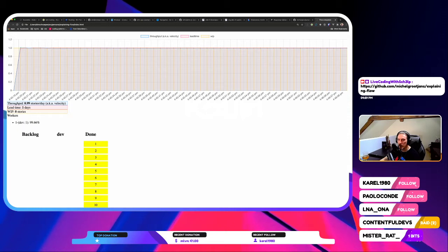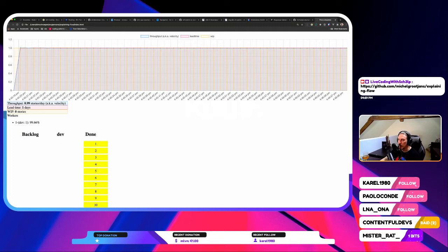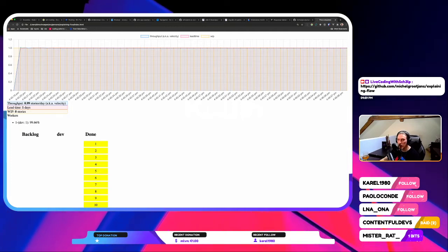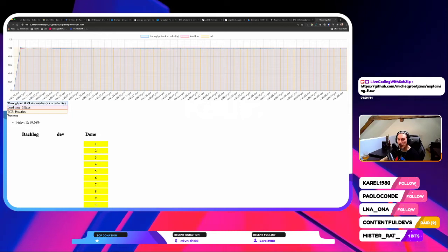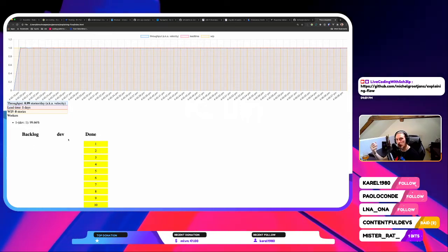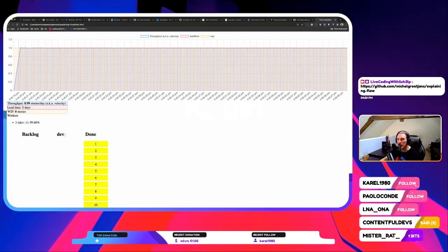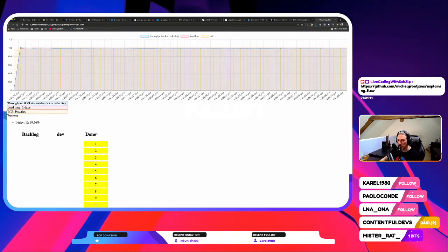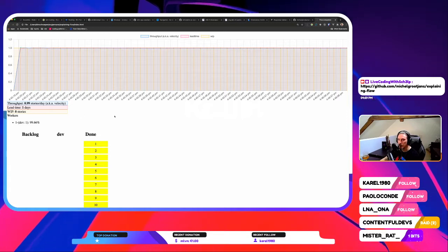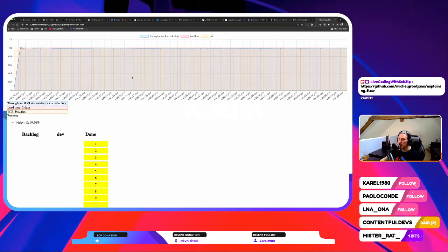What we're tracking here is throughput: how many stories per day can this developer deliver. And then we've got a lead time of 1. Whenever a dev takes up one item out of the backlog and starts working on it, it will take them 1 day until it gets delivered. That's what we track as lead time here, so it just stays constant.